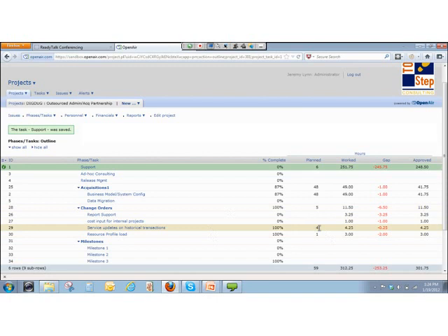The resource profile load was estimated to be 1 hour, but it took us 3 hours. But we finished this item and we closed it. So that's also 100% complete. But the other two, they don't have any effort. They're 0% complete. So if you look at what happened, the phase does not average percentages across this. It's actually rolling up and saying, oh, I have a total of 5. I've worked 11.5. I therefore am 100% complete on this phase. That may not be what you intended.